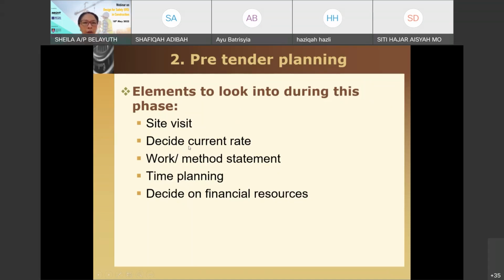Okay, next, basically, you need to know the rate of the material. Okay, so you can't expect the material price to be the same over the years. Cannot. So material price fluctuates, especially when we are having this COVID, shortage of materials, supply cannot reach, factory closed. It creates chaos. And foreign exchange, if your currency goes very low, and the materials are needed for you to import, you have to pay more. So for construction, the prices fluctuate. So important for you to know what is the current. You can't expect 10 years ago, the pricing still remains the same.